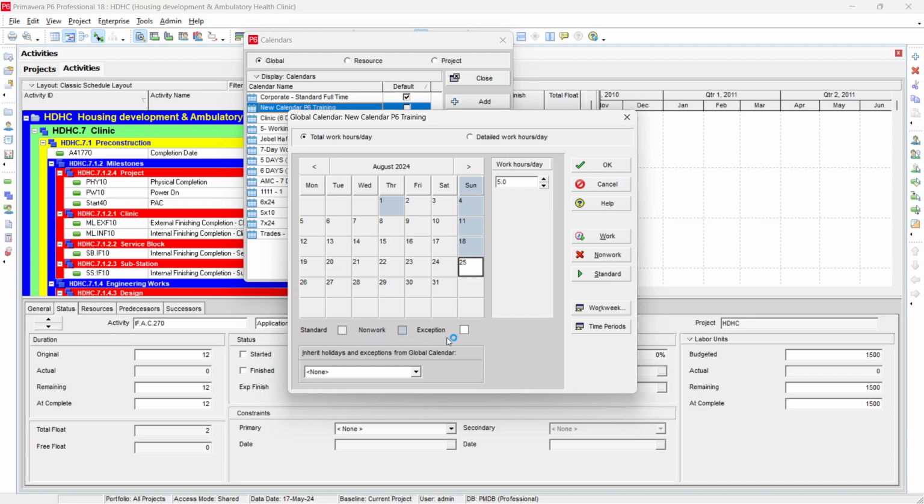Always define all the holidays properly, and all the working hours. For example, in some countries there are Ramzan hours also. In Ramzan they reduce working hours, so you have to select Ramzan and apply the reduced working hours.